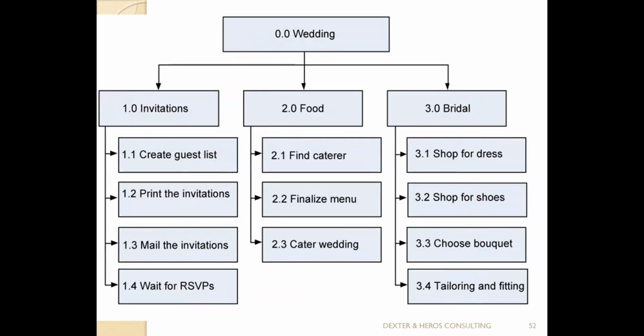Now, it's called account of identification. It's part of the thing you include in your WBS. It enables us to track each of the elements in your WBS. For example, if your phase one is bearing an account 1.0, every work package, every scope, every work under that particular phase must bear 1 point, 1 point, 1 point. If you assign phase 4 the code 4.0, every work under that phase must be 4 point, 4 point, 4 point.